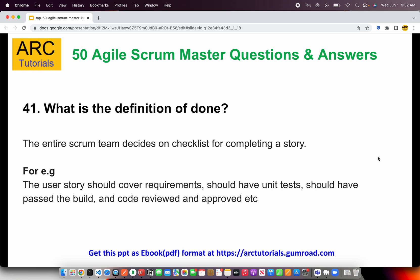In some enterprises, they will say that only development work should be done. In some enterprises they will say QA should also be done on the story. In some enterprises they will say it has to go to a higher environment like QA or UAT deployed. So the definition of done can vary between enterprises and different clients, but overall the entire scrum team comes together and decides on what they call the definition of done — what is the checklist.